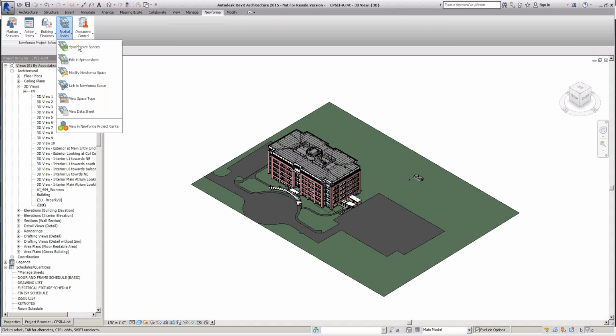And the big benefit here of using this space data is when it comes to creating punch list items, which I've been talking about the Plans app as a way to do that, but the Capture app in Newforma allows you to create punch list items, action items, and field notes, just like the Plans app. The difference being the Capture app does that without needing to have a drawing sheet as a reference. The Plans app is using that drawing sheet as a reference.